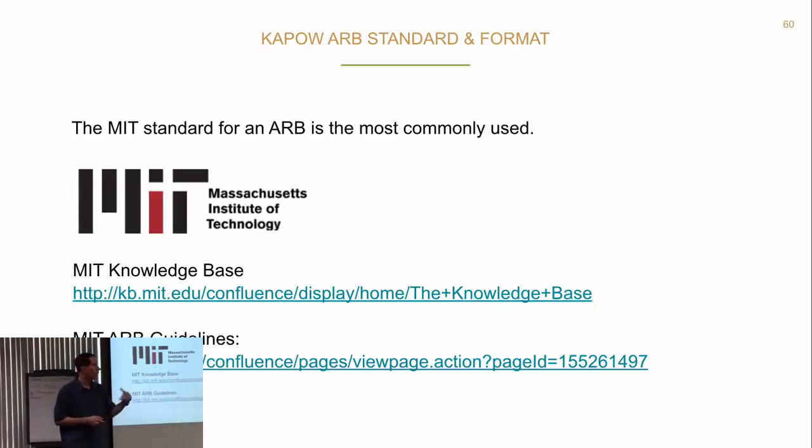Or hey, as we come on board with CVent, they're using Scaled Agile Framework, SAFe. That has something in it called an architectural runway, where you do enablers and you do functions. You build just enough design, consume. Build, design, consume. That's called architectural runway. It's SAFe, and that's one of the things we introduced in the ARB. That was new for a lot of folks. It's getting back to that principle of design just enough. Not really well spelled out in the original manifesto, but certainly in the Scaled Agile frameworks, we're starting to see that spelled out, and they want that piece in there.